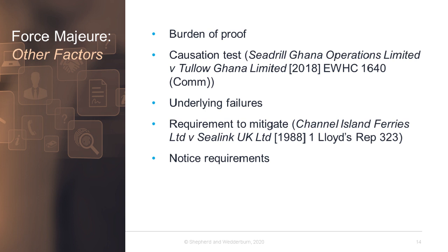Force majeure events can also not be used to mask underlying failures. If, even without the force majeure event occurring, a party would have failed to meet its contractual obligation, it can't seek to rely on the force majeure event to avoid liability. Again, that's important because it's all about the underlying circumstances.